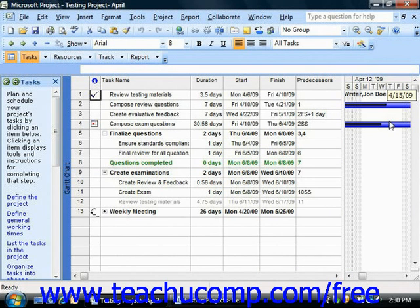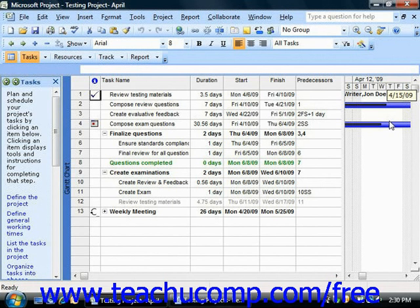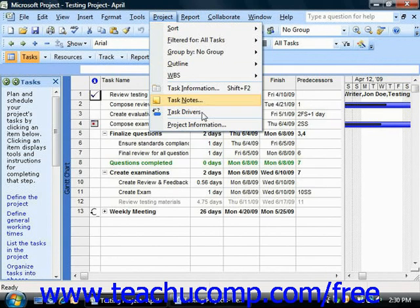You must also have accurately recorded the actual work and costs within the project file. In addition, you must select a status date so that Microsoft Office Project can compare the baseline values against the values recorded as of the status date. You can specify the status date within the Project Information dialog box, which you can open by selecting Project from the menu bar and then choosing the Project Information command.